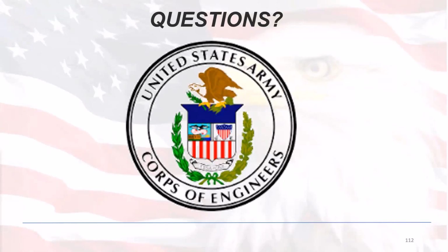It's not going to hurt if you do an SDEF import and then a couple days later you realize, oh, I forgot to add this, and then do another SDEF import. RMS will let you know, hey, here's what's changing if you do the SDEF import. So it's perfectly fine to do a whole bunch of those if you want.